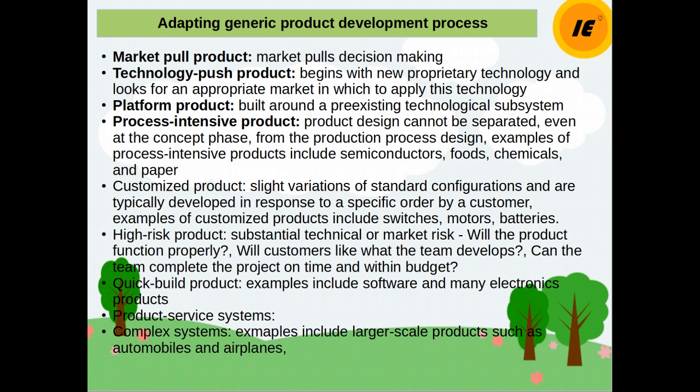Following concept development in this process, the system level design phase entails decomposition of the product into high, medium and low priority features. This is followed by several cycles of design, build, integrate and test activities, beginning with the highest priority item. When time and budget run out, usually all of the high and medium priority features have been incorporated into the evolving product, and the low priority features may be omitted until the next product generation.